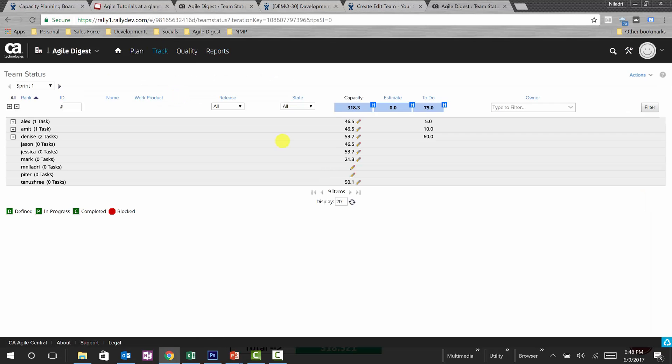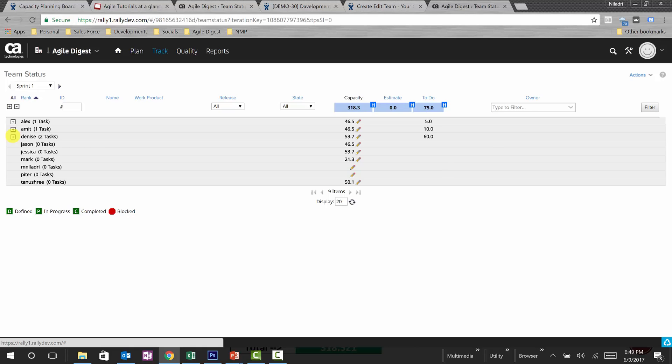Irrespective of different stories, you can have it will sum up all of them and show in team status. So if you see team status, this is 60. So this is actually a high risk for the team because whatever the capacity you have and the to-do is more, so you need to take an action over there.